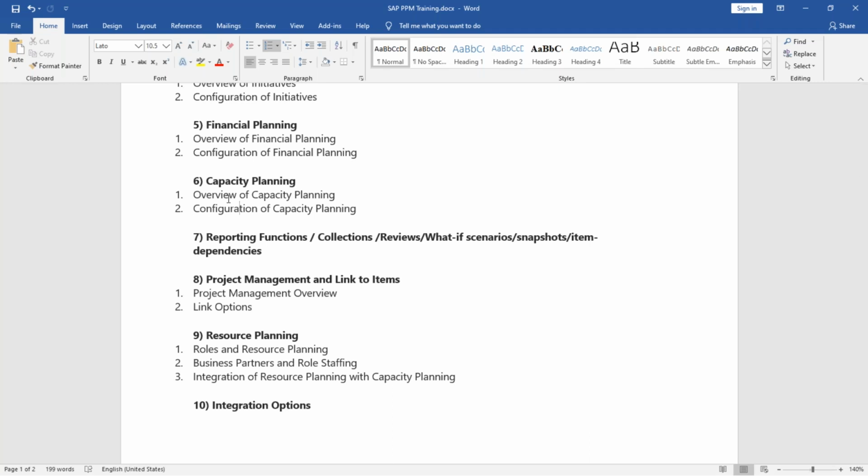In item you will not see any resource name or anything. Everything resource related you will see in resource planning in the project. What you talked about, exactly the same thing we will do there, and we will do the effort distribution of that effort across the months. Let's say I have 200 hours of work that has come up, and I have a resource who works 8 hours per day, and I need to utilize that from January to February.